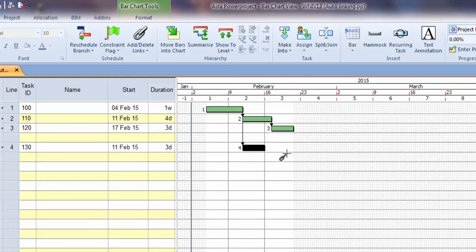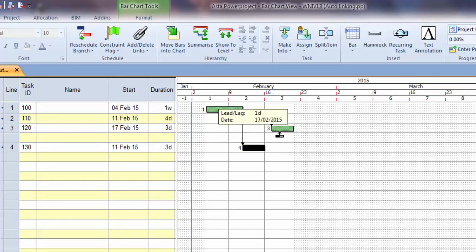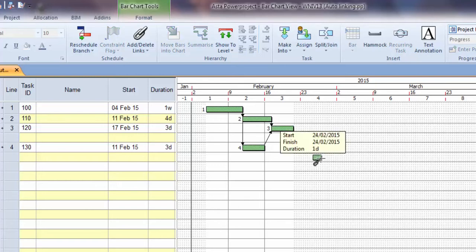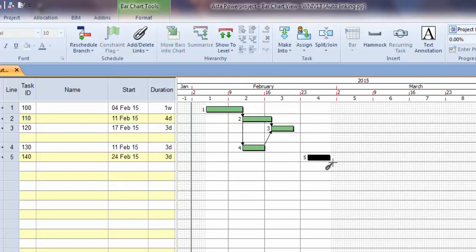So if we select another activity and create another task, then it's drawn a link between those two. If we've got this lot of tasks selected, if I click on this task here, it creates a link between those two.